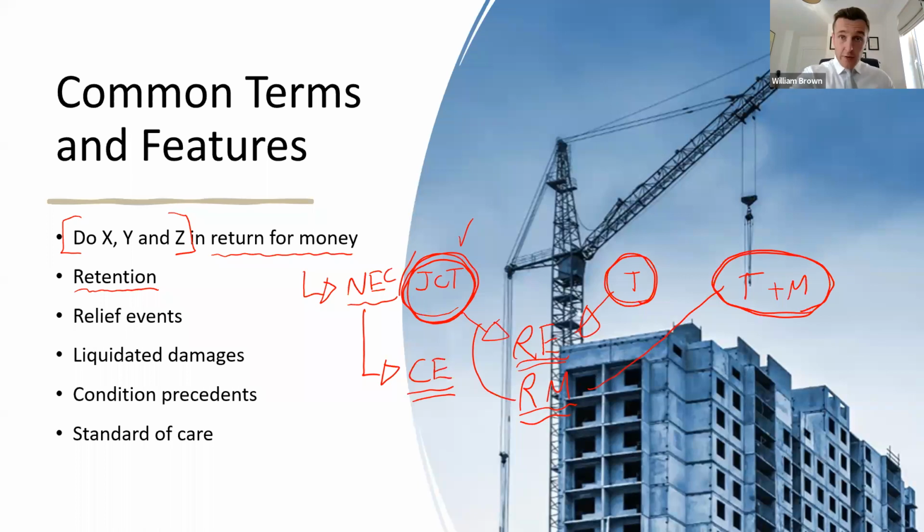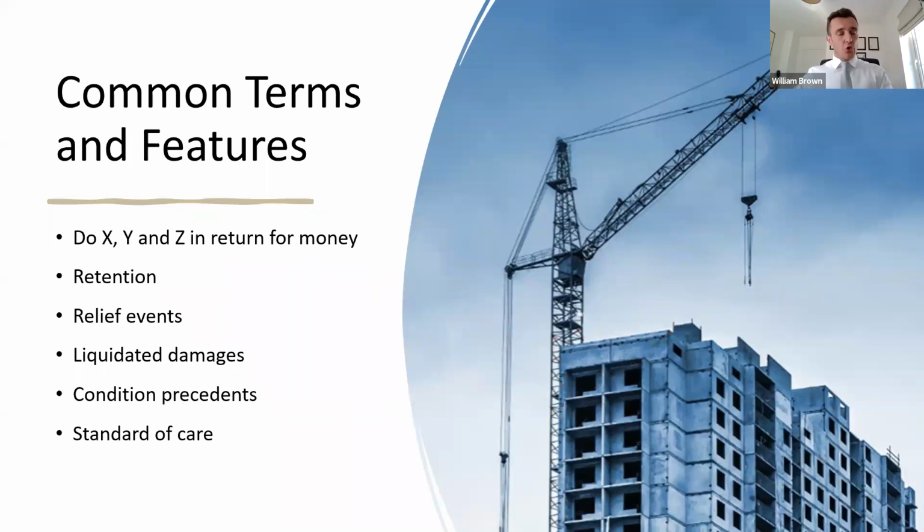And under the Public Works, a change order is a compensation event where you would get time and money. You wouldn't only get time associated with that. And that's a common feature between all of the standard forms. Instructions to do something different would normally entitle you to both the time and the money for that.